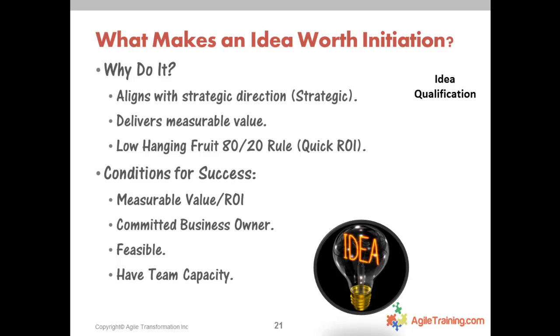So let's go through now and talk about what qualification filter you should have for each idea that comes in. Should we do it? Should we not do it? Well, first of all, you might ask, does it align with the strategic direction? Does it deliver measurable value based on what you just did over here? Is it low-hanging fruit or not? Conditions of success. Do I have a committed business owner? Is there someone who's really going to see this through or not? Do I even have the capacity to do it? Is it even feasible? Is it the kind of technology that we actually have?